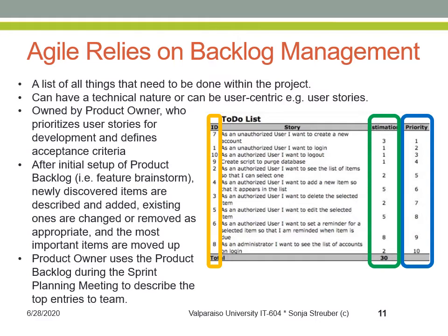As you can see, this column contains numbers. These are called story points. Story points are estimates of effort. They depend on the amount of work required to build the user story, the complexity of the work, meaning how hard it is to build, and the risk and uncertainty, especially if this is something the team has never built before.